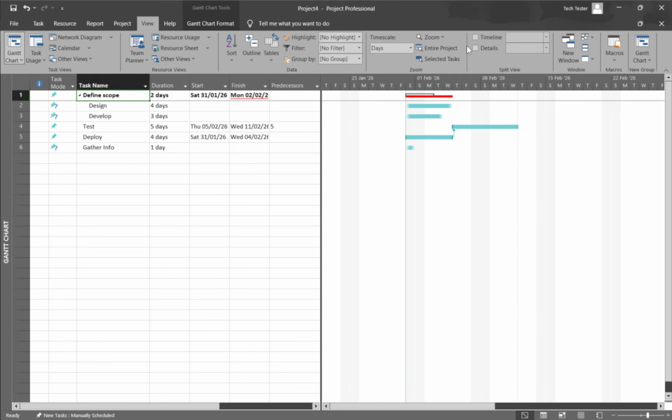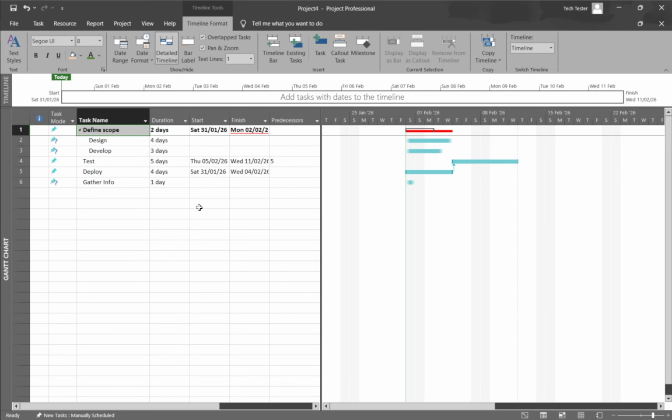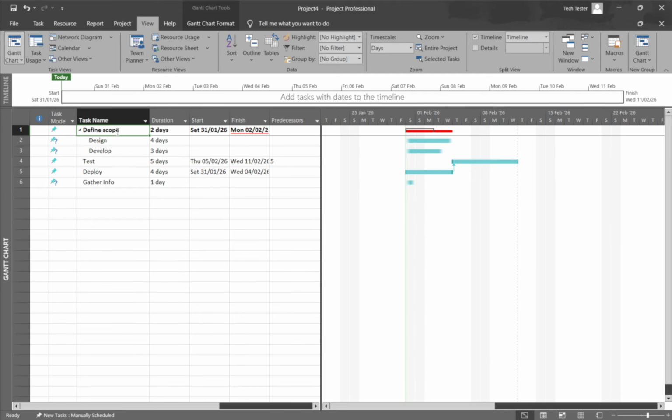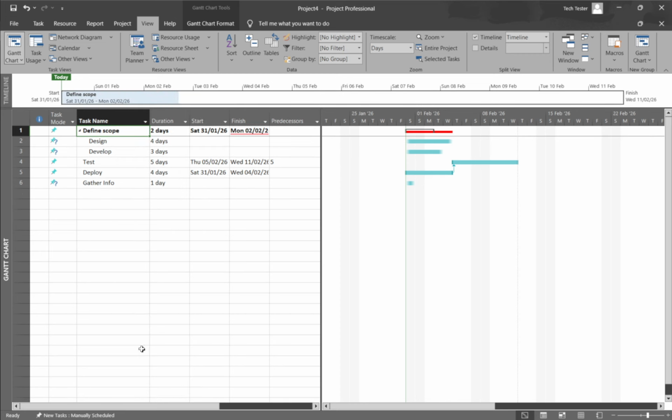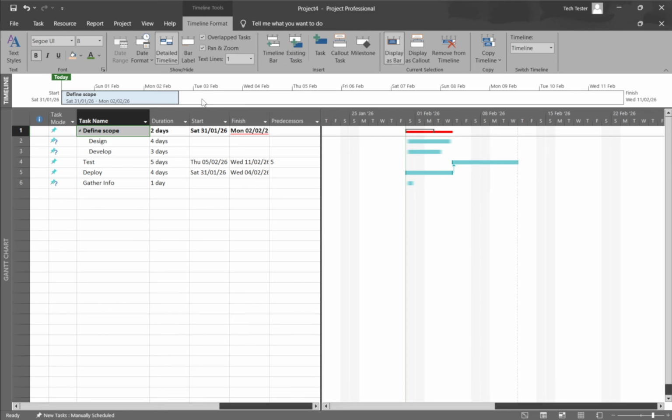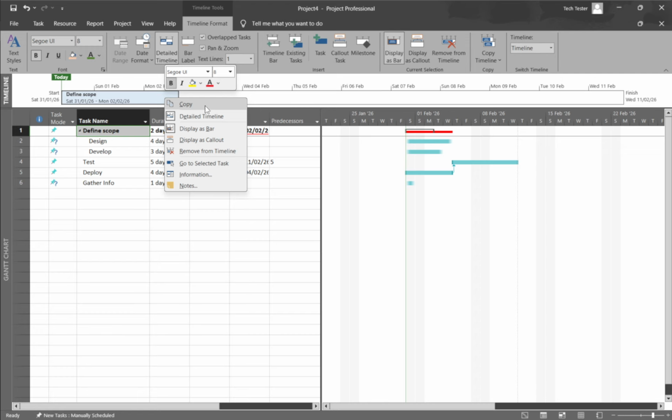With the space ready, start adding the items you want to highlight. In the Gantt chart, or any task list, right-click a task or a milestone and select Add to Timeline. Repeat that for each key deliverable or checkpoint you want to communicate. Tasks will show up as horizontal bars spanning their start and finish dates, while milestones appear as markers on the exact date. You can remove an item later by right-clicking it on the timeline and choosing the Remove option, so don't worry about being too cautious at first.